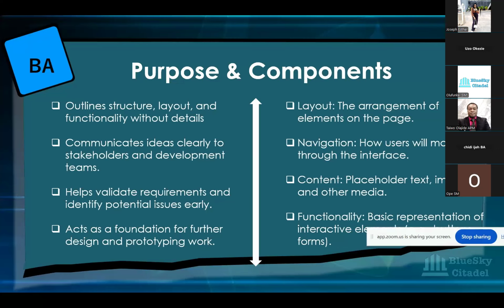So if you put all the detail in your wireframe, the QAs are just looking at you like, I don't understand what you're doing. How can I test that this story is fit for purpose? Everything has to be in your acceptance criteria. If you have the logo on the left side, you write the logo is on the left side. If the footer is arranged in columns, you write the footer is arranged in columns, and these are the different things in those columns. Once you put it in acceptance criteria, then feel free to put it in your wireframe.